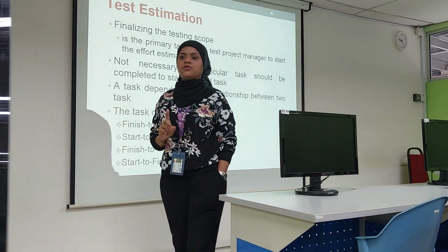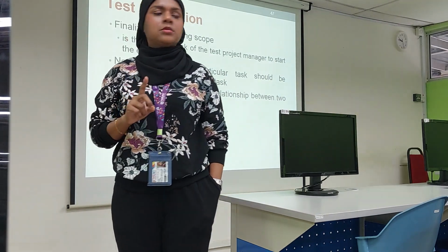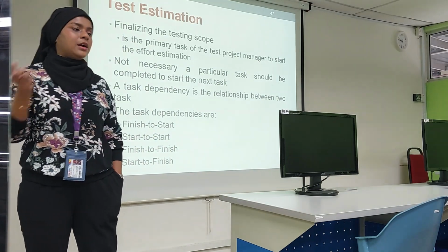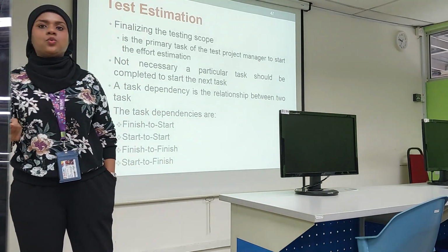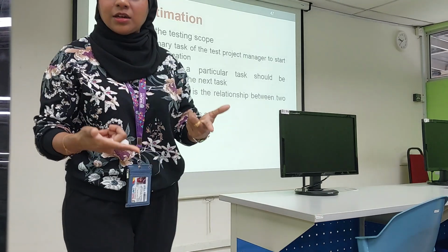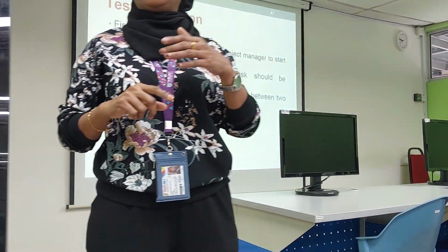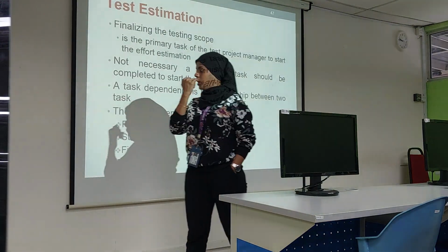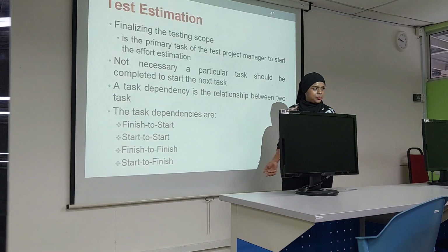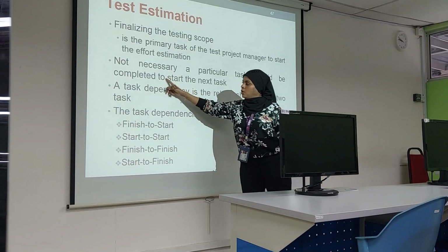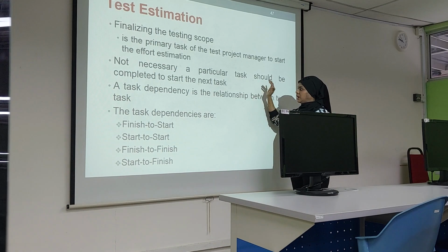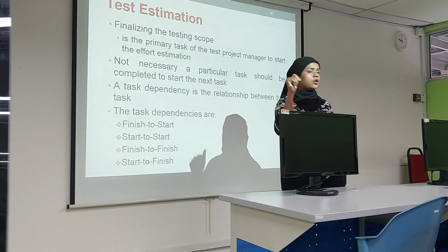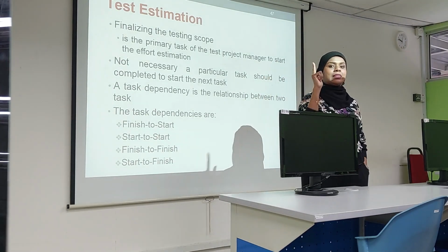You have discussed this when you prepared the Gantt chart. Which task you need to start first, which one you will need to wait until you complete this task, which ones need to start together, which one needs to start earlier, which one later. So this is actually task dependency. So when we do our task estimation, we need to know this task dependency and the right task to start end to end, so that we will not waste resources, we will not waste time.